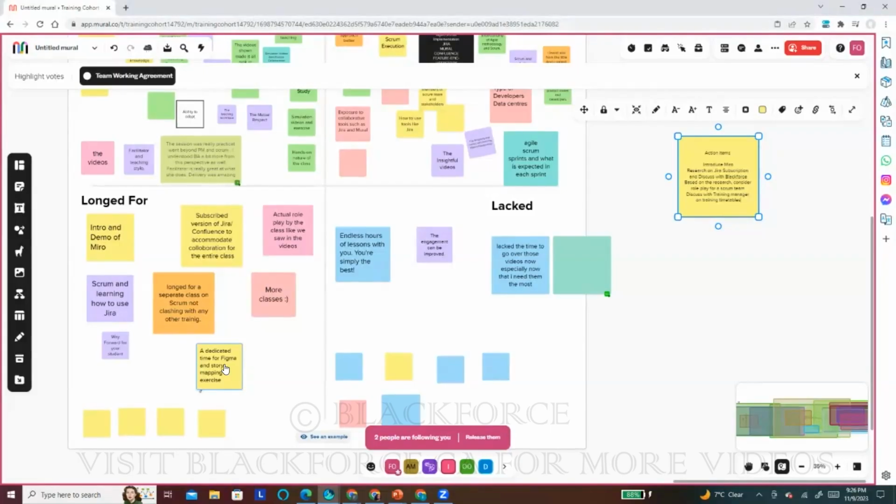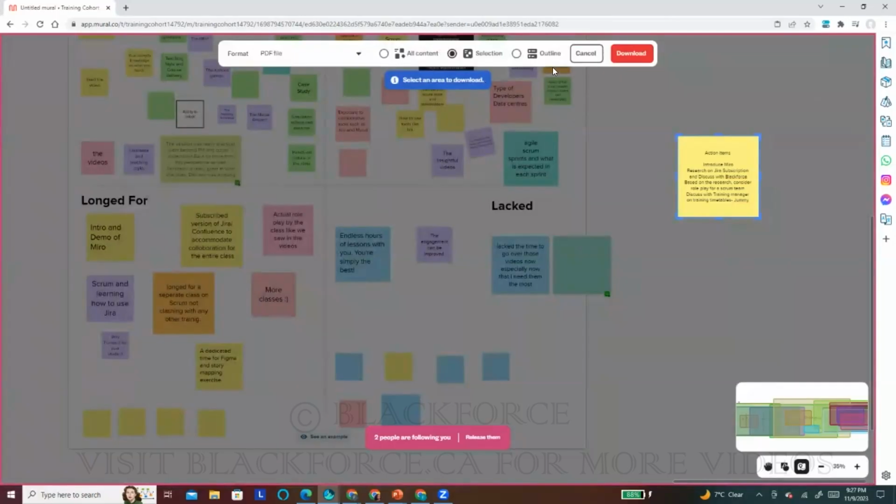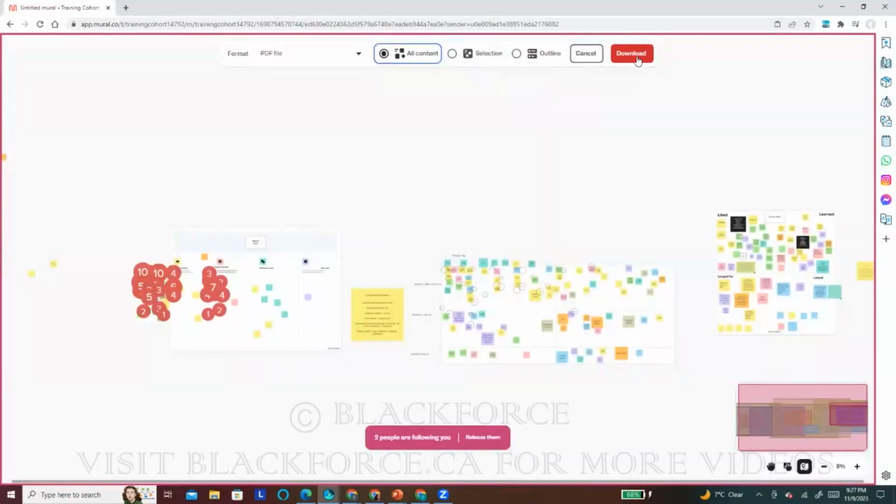Sometimes people wrap up their retro by saying, okay, are you guys okay with it? Are you good with the action items? Who would like to take charge of one action item? On the clashing of the training, maybe Jimmy will say, oh, I will take this up, discuss with the training manager on the training timetable. We'll then say, okay, let's assign this to Jimmy. So we take up that work. Now we know all the details, we'll download this and put it on our Jira board.